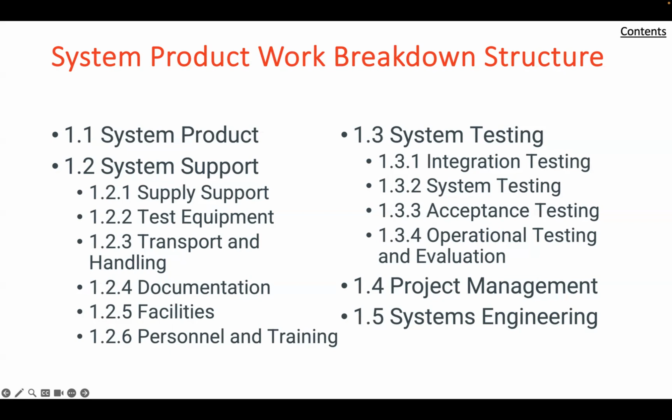In general, program control, which includes costing, is exercised at the level at which detailed specification, interface definitions, and work assignments are available, representing in effect a contract between the project and the organization charged with the responsibility for developing, engineering, or fabricating given elements of the system.